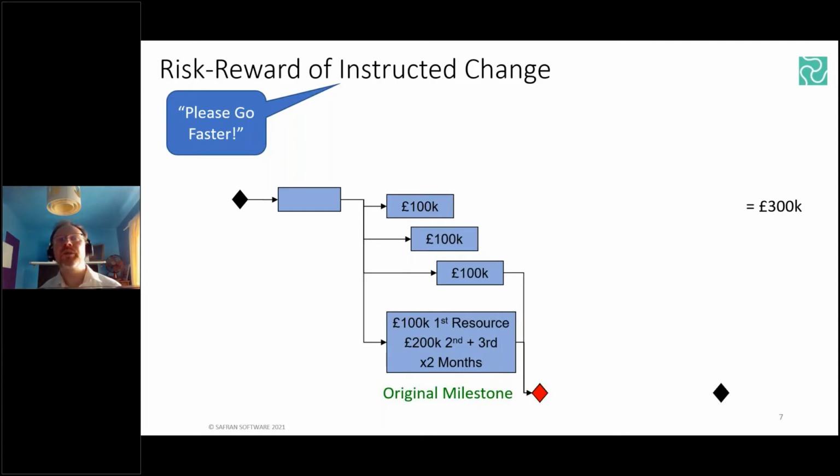So we've worked with the project manager to resequence some of the work such that there's now an overlap of parallel working within our underground construction site, but maintaining the same cost for those 3 items. But it was difficult to find more of the specialist resource to complete that longest activity, to make that go any faster. So we can technically throw more resources at this activity, but the additional resources are going to cost